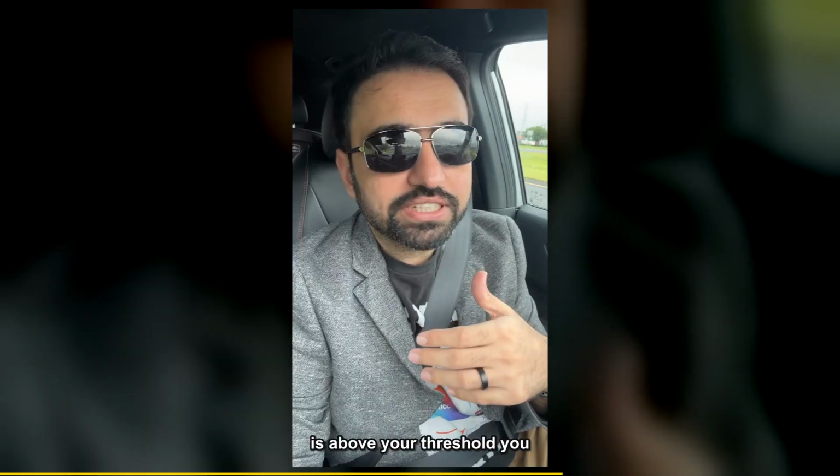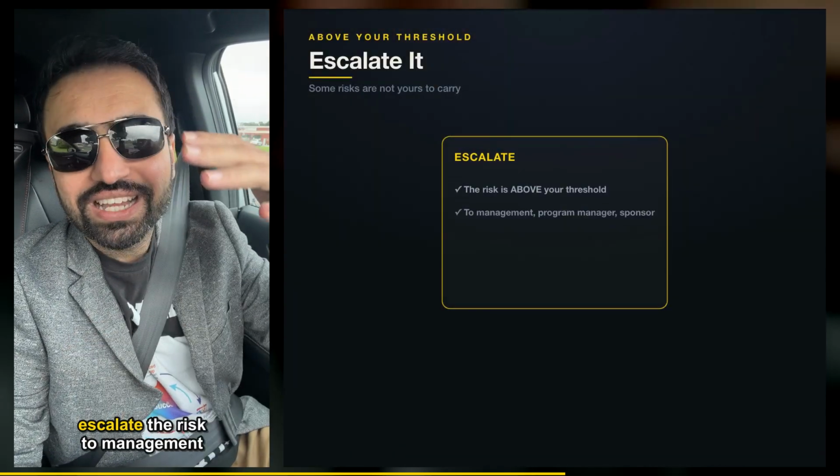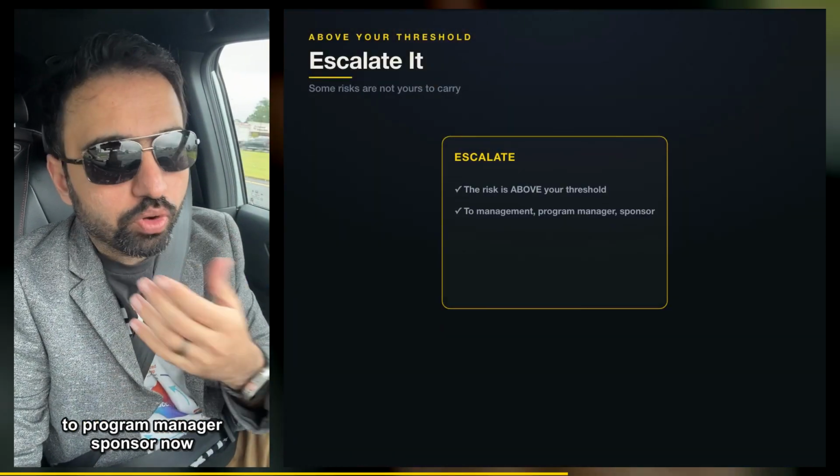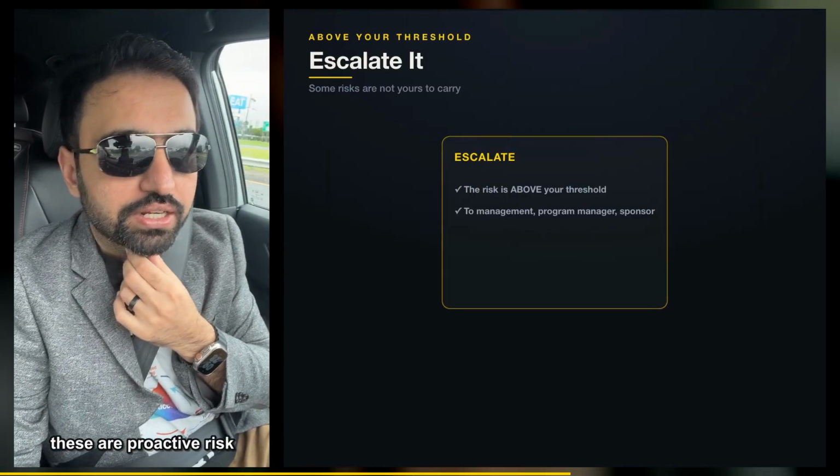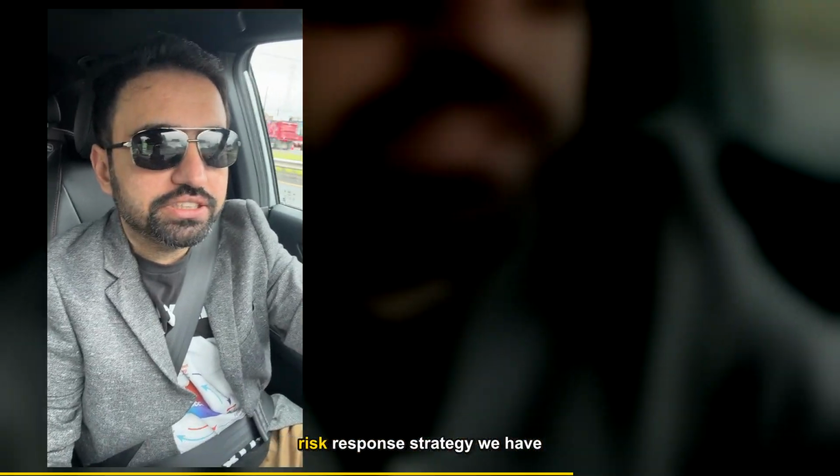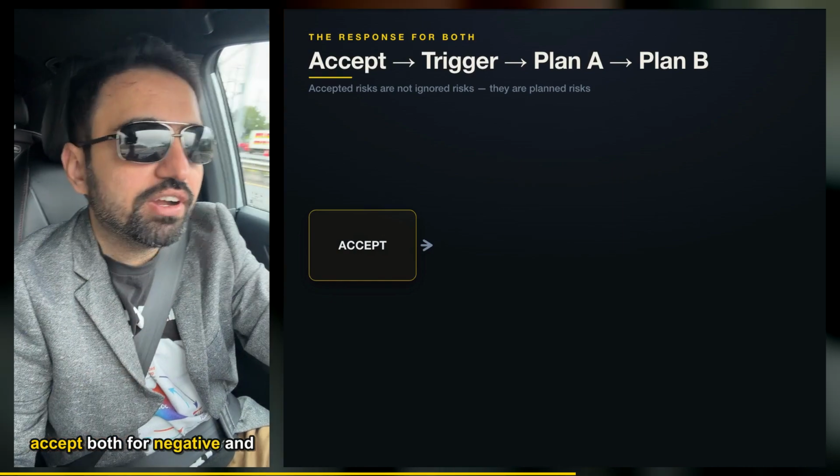If the risk is above your threshold, you escalate the risk to management, the program manager, or the sponsor. Now, these are proactive risk response strategies. We have accept, for both negative and positive.